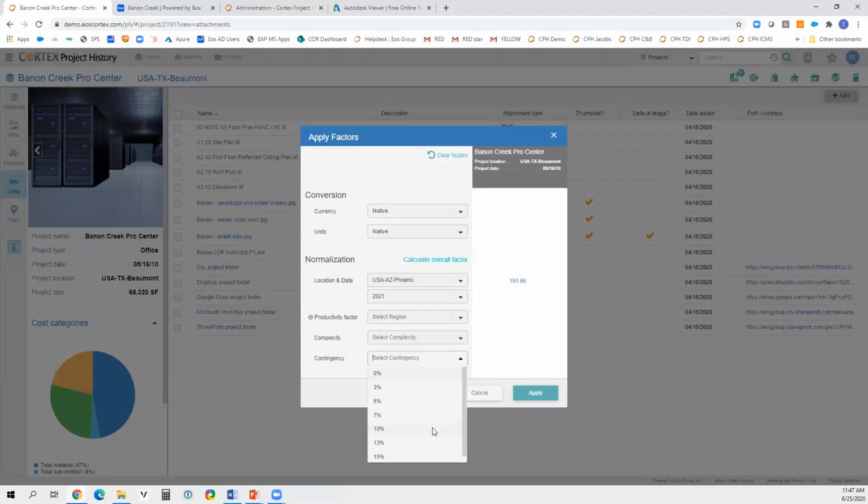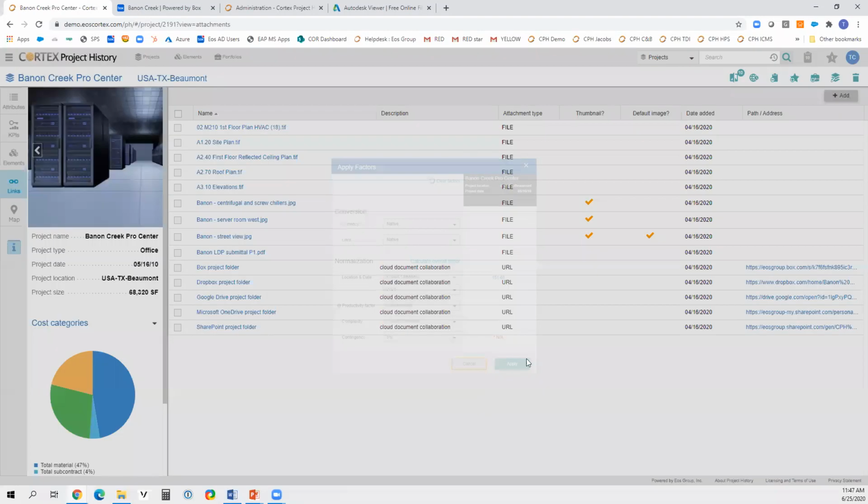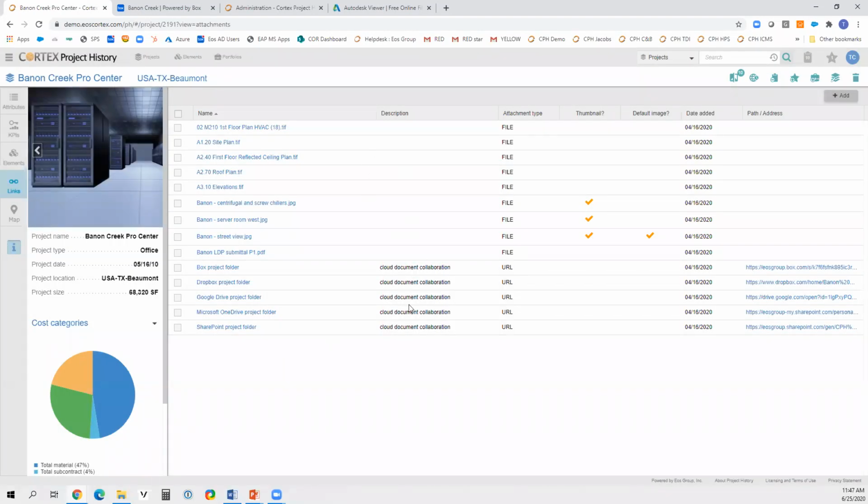And these are maintained in rate tables. So you could set up the increments of rates that you want, and it would allow you to adjust that. This project, I think I set up this contingency for the plant projects, so the building projects don't have it, but literally anything you want to configure, you can put together and factor projects with that information.